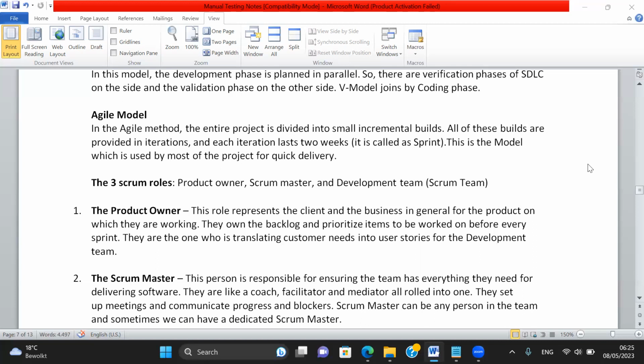My product owner had some imagination, like my application should look like this. We took that and presented it to him in the demo after 2 weeks. While seeing it, he thought, I thought this would be good, but it's not good this way, if we change it another way it will be very good. Then he will come up with changes in the next sprint, and we are going to accept the changes in the next sprint.